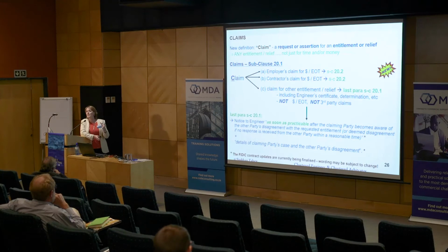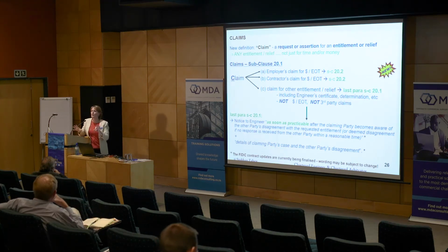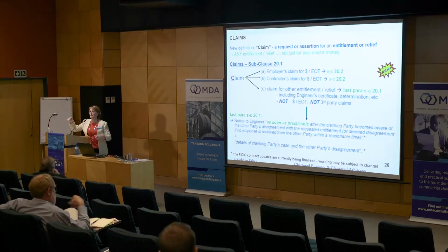So now we have, when the updates come out, and Ewan alluded to it this morning, we separate, because we want to make it very clear to users. You are very sophisticated users. We want to make it clear to all users. Claims are different from disputes. And so the optics of it are that the claims come under Clause 20 and disputes are dealt with under Clause 21. Very simple thing.